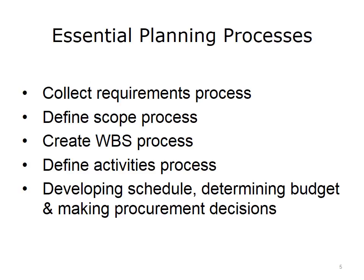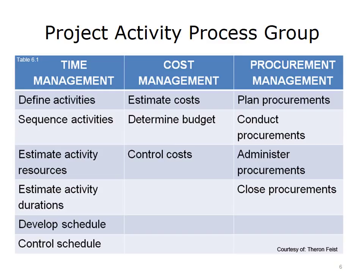This slide provides an overview of the sequence of activities followed by the project team during project planning. The following five essential processes are required to develop a schedule, determine the budget, and make procurement decisions: complete the collect requirements process, complete the scope definition process, create a WBS, begin to decompose or define activities within that WBS, and finally develop a schedule, determine a budget, and begin to make procurement decisions.